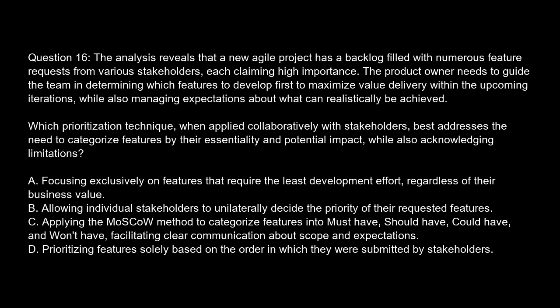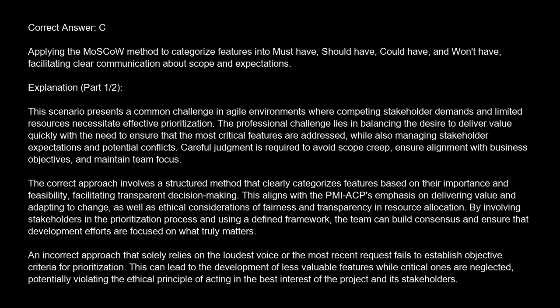Option D. Prioritizing features solely based on the order in which they were submitted by stakeholders. The correct answer is C. Applying the MoSCoW method to categorize features into must-have, should-have, could-have, and won't-have, facilitating clear communication about scope and expectations.